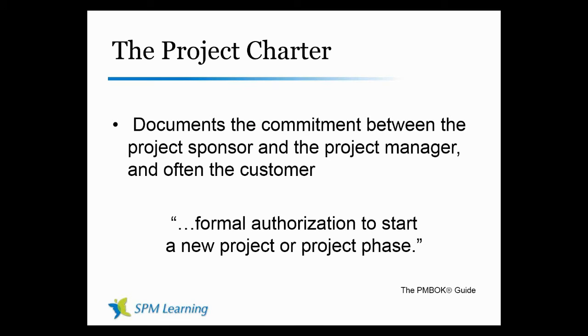So if I look at PMBOK, it's basically documents the commitment between the sponsor, the project manager, often the customer. So really about getting permission, the formal authorization. Now, again, we're going to scale this up and down based on what makes sense. So if I'm doing that very small project, it's a couple weeks, there's 3 of us on the team, that charter, that authorization might look like just an email from my boss. If we're doing a $5 million 3-year project, it's going to be bigger. Okay, and we're going to scale that to what makes sense.